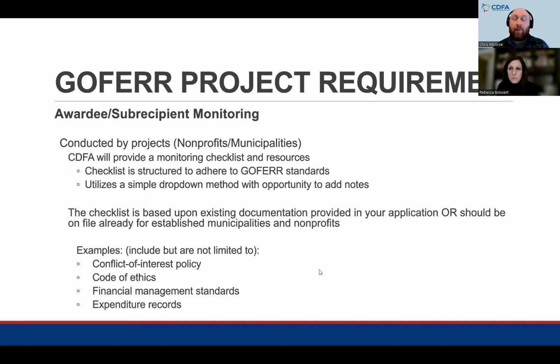So typically implementation schedules could be anywhere between maybe 5 to 10 pieces. And then if upon our review we're noticing a gap or something that might be missing, that might be critical, we just might ask that you add that into your implementation schedule, if that makes sense. And we'll talk a little bit more about that later. Great. That's the only question for now.